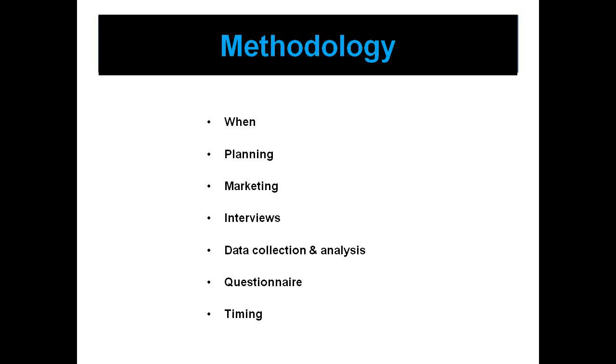The methodology of the post-occupancy evaluation, this is quite important. And before we even get there, there's three levels of post-occupancy evaluation. There's the indicative level. It's a quick and cheap way of doing a walkthrough and some fairly structured interviews. The findings are limited, but it gives us a taste of what's going on.